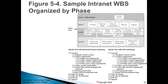The other way to create a work breakdown structure is to break down tasks according to the classic phases of a project: concept phase, design phase, development phase, implementation or rollout phase, and support phase. Under each of those classic phases, you add specific actions and steps. That's another way to approach decomposition of your scope statement for creating a work breakdown structure.